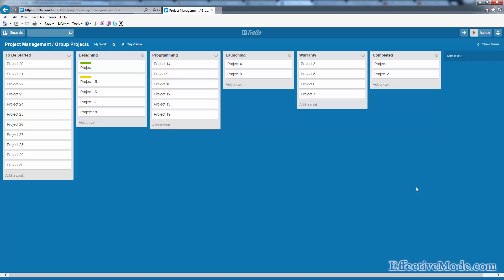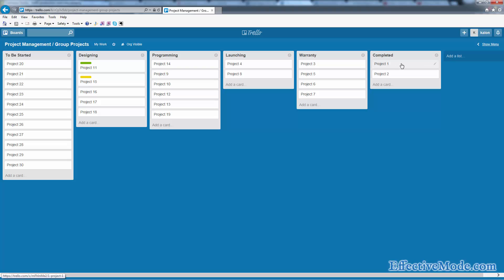The only reason you wouldn't want to use this is if you needed client communication on each project and wanted that to go through your board. In that situation, you'd want to use a single board per project so that when you invite that client to that board, they won't have access to all the other projects in your chain. So you may use this for an internal process and use an individual project management board for the individual projects so you can work on substates or communicate with the client through different stages of the process.